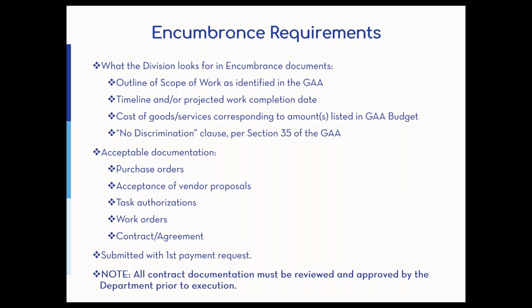There should be a timeline or a projected work completion date in the contract. The actual cost, you would not believe how many contracts I get that don't have any fees in them. Need to know that the entire grant award and match is encompassed in that contract or part of it. So you may have multiple contracts, which is fine.